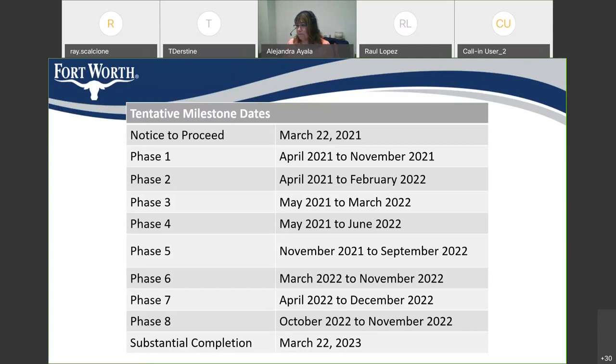I'm going to add to that, Alex, we have 2 people that permit traffic control plans for the entire city. It used to be one, now he's got some help. Those 2 people are watching what construction is taking place before they issue another permit to close a lane or close the road. So they're very vigilant of that. Rest assured that we won't allow multi-lane closures by different construction that will cause more congestion. Okay, thank you. Sure.